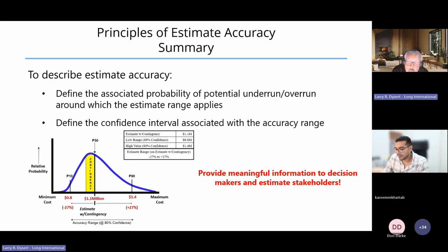And then there are recommended practices behind these several individual quantitative risk analysis methodologies. Some use Monte Carlo simulations, some do not. Some use CPM scheduling, cost-loaded CPM scheduling, to generate the curve. But that's where you would start: read PGD02, and then the selected risk analysis recommended practices.